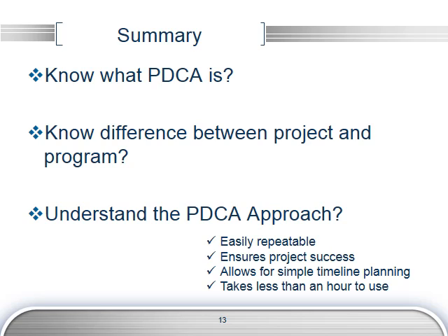So you can simply put together your project plan in Excel, and if you use Microsoft Project, you can cut and paste those things directly into Microsoft Project, and now you have something that's very easy to manage if you're good with that program. You can create Gantt charts off of that and track your progress and report. So this simple approach takes less than an hour and gives you all of those abilities.